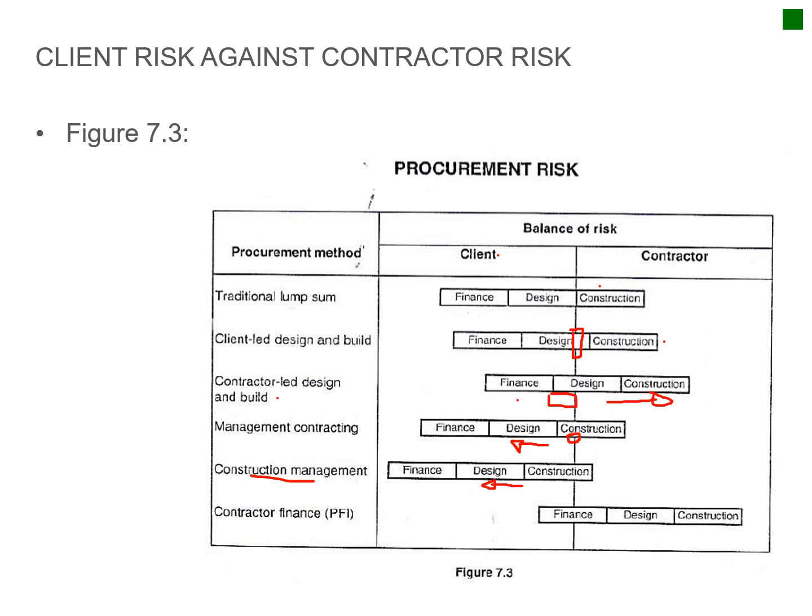And then you have contractor finance, where the contractor actually acts as the developer, or the consultant does the development and takes most of the risk on himself. This is what usually happens when work is maybe low and contractors try and generate their own work.